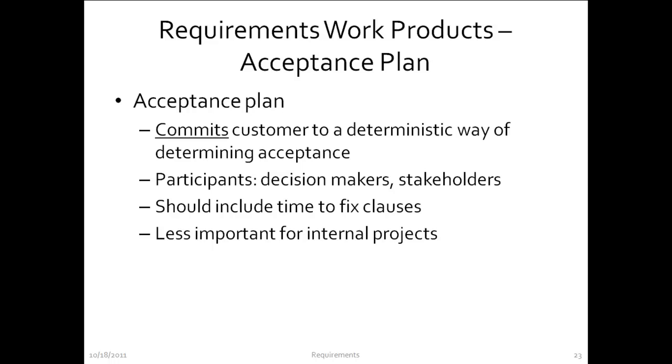And also an acceptance plan is less important for internal projects because it's after all people from the same company doing this project. If something fails, somebody will fix it, etc. One quick thing, I don't know how many of you ever bought a house or built a new house, especially. There is usually a walkthrough at the end just before you sign the closing documents, where you go through the house and check everything off. And the idea is if you find anything wrong in that walkthrough, the builder will fix it for you within a specific amount of time. That's essentially what an acceptance plan is.